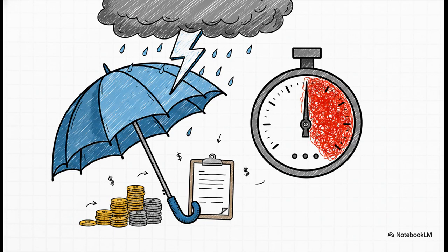And lastly, you absolutely have to stress test this forecast. I mean it. Always model a delayed payment scenario. What happens if the client pays 2 weeks late? What if it's 4 weeks? You need to know exactly what your worst-case financing requirement looks like before it actually hits your bank account. Because honestly, preparing for a disaster on a spreadsheet is infinitely cheaper than trying to navigate one in real life.